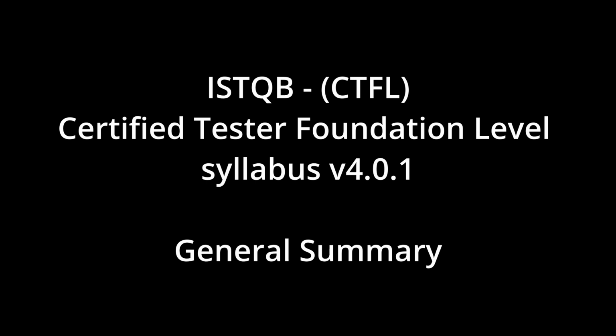What kind of things does a test plan typically include? It usually covers quite a bit. Things like the testing context, the scope, what's in, what's out, the objectives, the test basis, the documents or requirements you're testing against, any assumptions being made and constraints you're working under, who the key stakeholders are and how communication will be managed, a risk register identifying potential product and project risks related to testing.